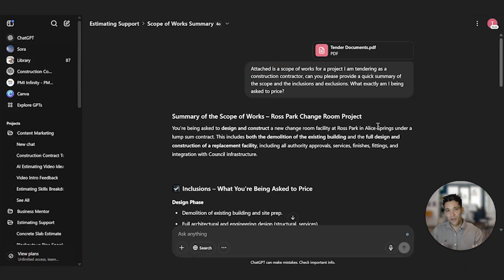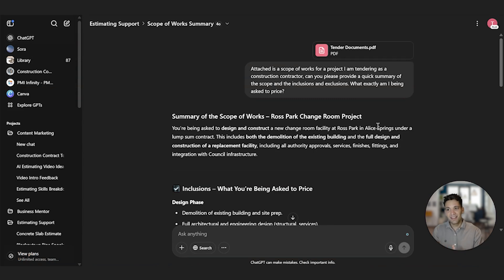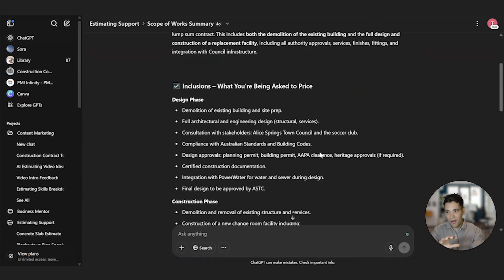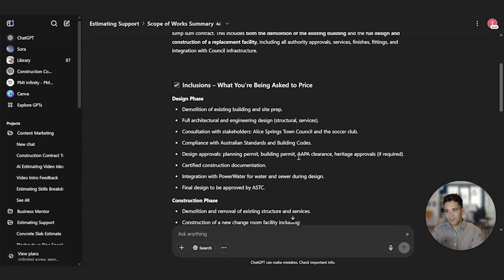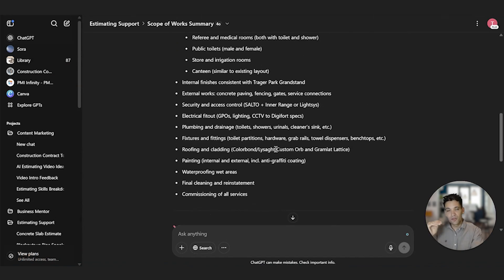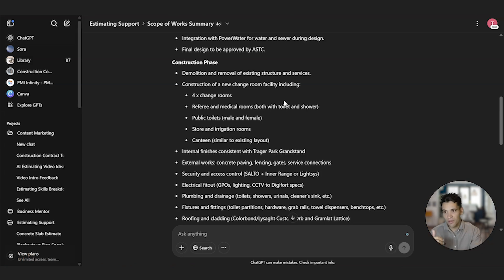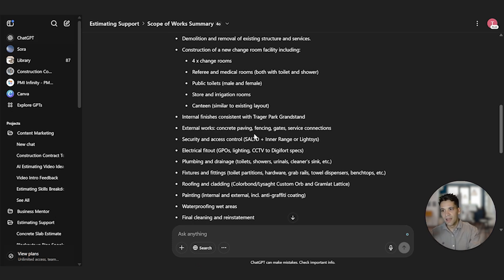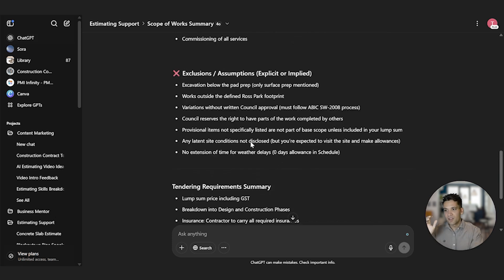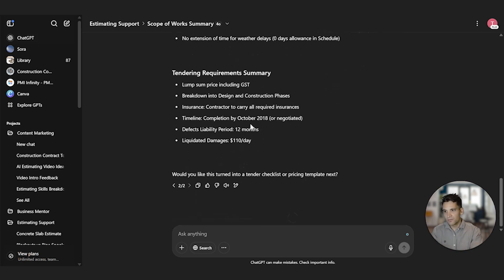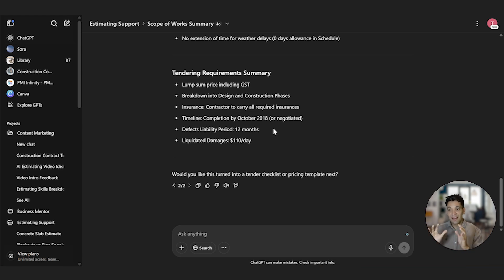So as an example, I've found a random construction scope of works online. I uploaded into ChatGPT and I asked it, attached is the scope of works for a project I'm tendering as a construction contractor, can you please provide a quick summary of the scope, the inclusions, the exclusions, and what exactly am I being asked to price? It's given me a one-paragraph summary, and then it's given me phase by phase of the project what I'm being asked to do during the design phase and during the construction phase. So during the construction phase, for example, it's told me I have to allow for the demolition and removal of existing structure and services, the construction of a new change room and facility, including four change rooms, medical rooms, public toilets, store and irrigation rooms, internal finishes. It's also listed the exclusions, that excavation I don't need to allow for, works outside the defined footprint, variations without written counsel approval, and it's also given me a summary of the tender requirements. It explained there's a 12-month defect liability and liquidated damages of $110 a day.